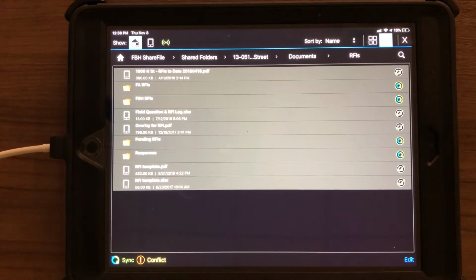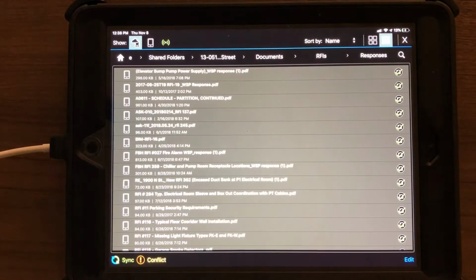A lot of times you can go in there and look through there all you want and see what's in there. Especially on a larger job where there's a lot of different crew leaders, probably most of them won't apply to specifically what you're working on, but probably something in at least one or two of them will apply to what you're working on. If we get RFIs back, it's usually the foreman's responsibility to let the crew leaders know that we've got an RFI that affects what you're working on. And a lot of times we're also putting them on the drawings themselves.